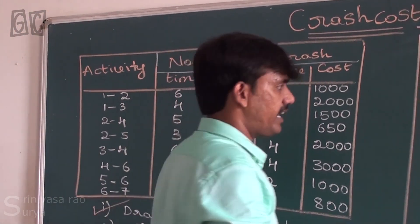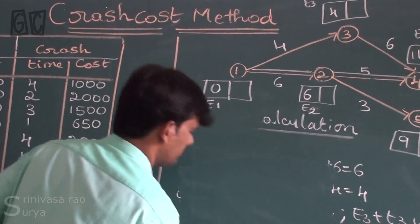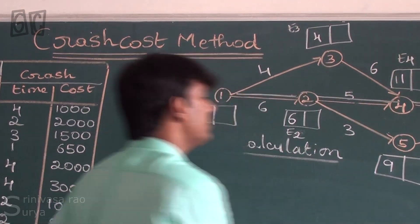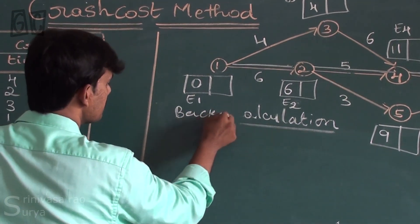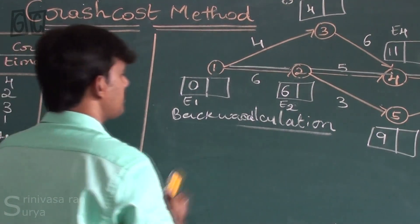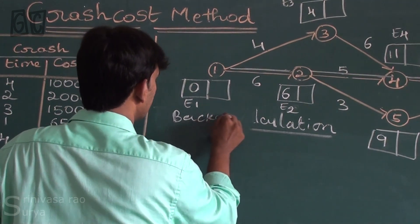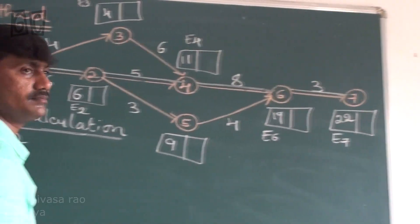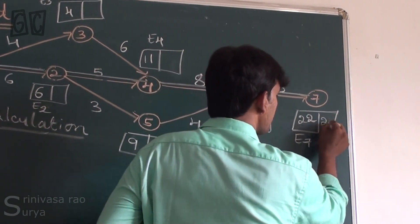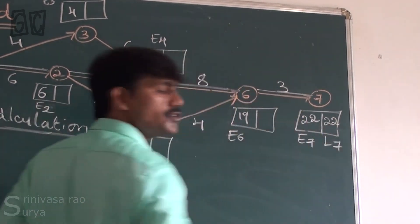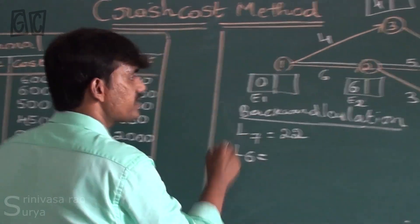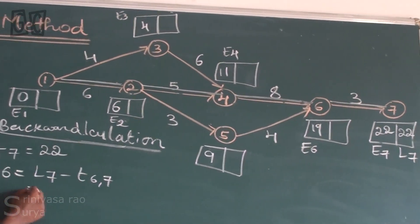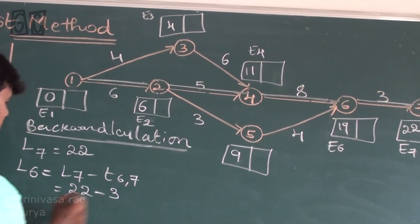Now we move on to the backward calculation. Fix L7 equal to 22 — the same value as the forward pass. L6 is inching towards L7, that is L7 minus time taken from 6 to 7, so 22 minus 3 gives L6 equal to 19.